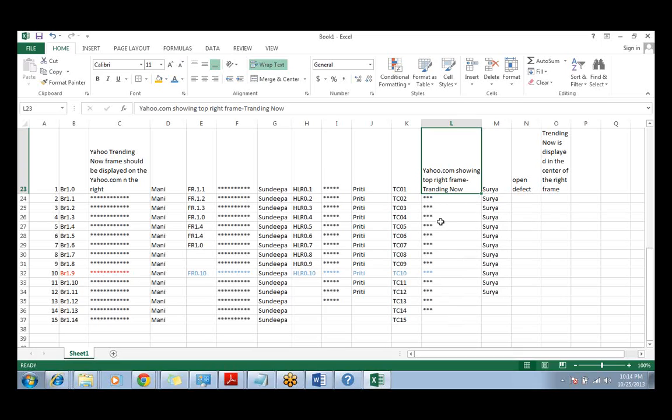See, this is a requirement traceability matrix, where you are just making sure that each of the requirements which you have written over here is getting implemented, getting designed, getting tested. But your defect could be for any reason, any functionality could lead to this defect. So there is no one-on-one match from the defect perspective.